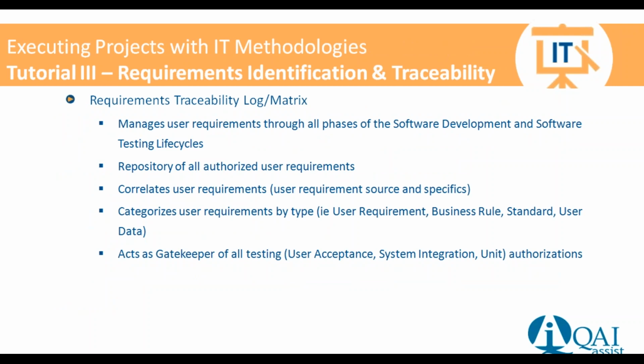We want to have a repository of all the authorized requirements, be it in the high-level solution design deliverable, the detailed solution design deliverables, or the programming specifications. We need a repository of all the requirements, with the naming conventions. We also want to correlate the user requirements as far as specifics go. We also want to categorize the requirements by type, be it a user requirement or a business rule or standard.